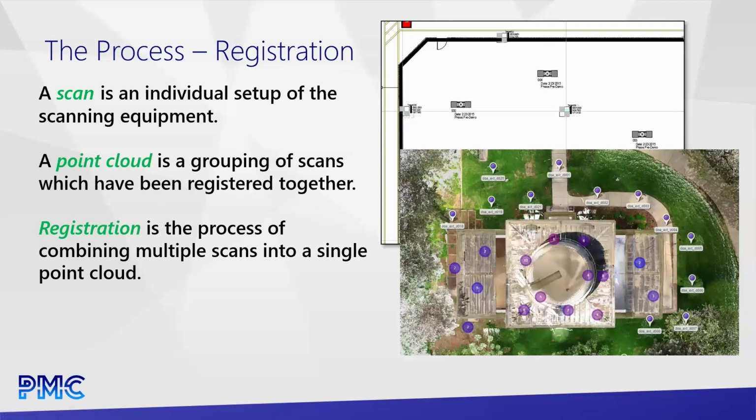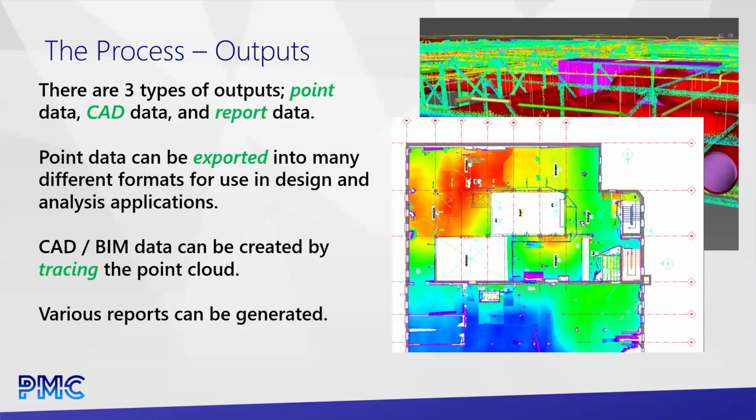One thing to keep in mind is, like I said, just consider that this process does take time, and this is time after the people have left the field. On the largest projects, this process can take a month sometimes to get through, depending on the volume, if there's 3,000 scans. After the registration process, we're going to get going with the outputs.